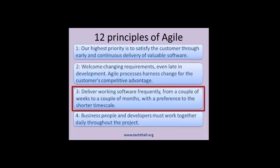Principle 3: Deliver working software frequently, from a couple of weeks to a couple of months, with a preference to the shorter timescale. Customers feel more confident in the team and product as it is updated frequently. Another advantage is instant feedback from the client to react immediately, instead of waiting months to see that everything has gone wrong.